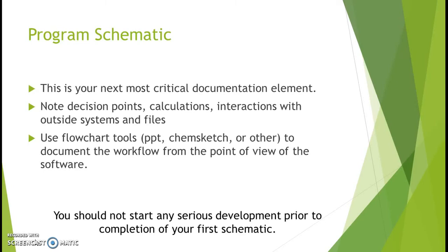No serious development of your product should begin until you have that first schematic, so that you understand what your interactions are and how everything fits together. Otherwise, you're at risk of implementing things that you won't eventually need.